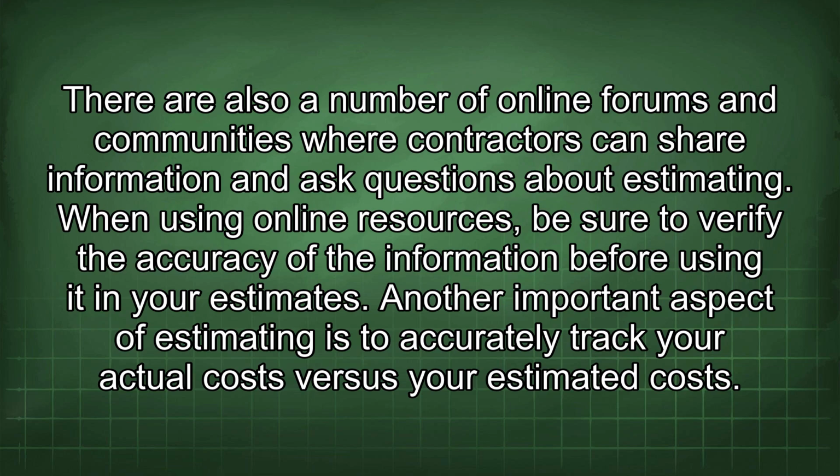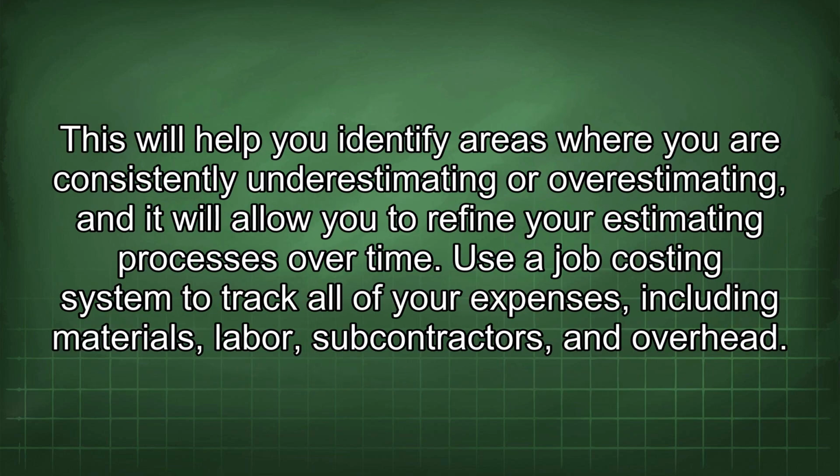Another important aspect of estimating is to accurately track your actual costs versus your estimated costs. This will help you identify areas where you are consistently underestimating or overestimating, and it will allow you to refine your estimating processes over time.